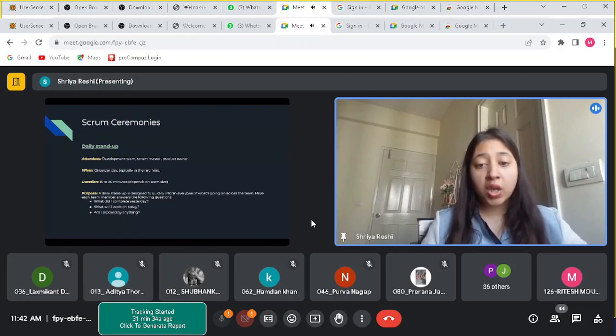The purpose of this call is to give a quick update on what everybody is working on that day in the development team. So they will answer three key questions: what did I do yesterday, what will I work on today, and if there are any issues or any blockers they have in doing their work. This is the purpose of the daily stand up, to have daily updates so that the product owner can take the updates, see if work is being done as planned for the sprint or not.